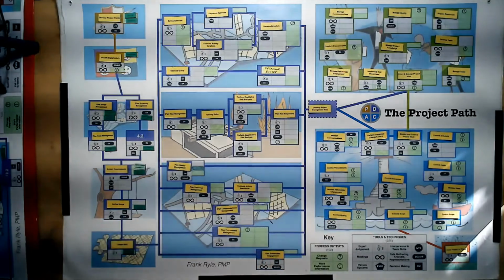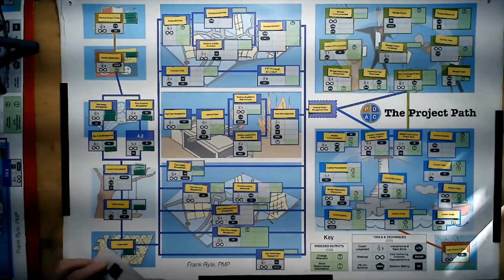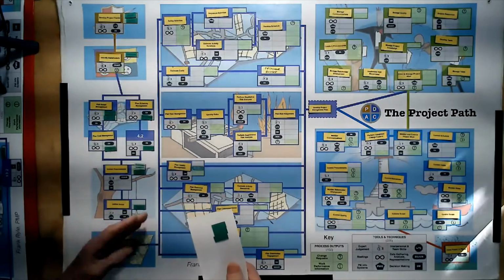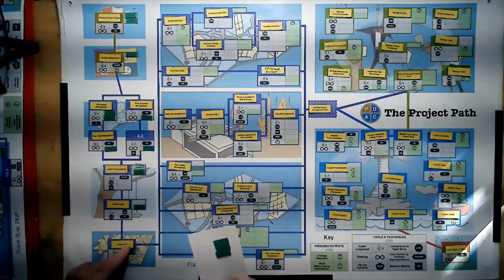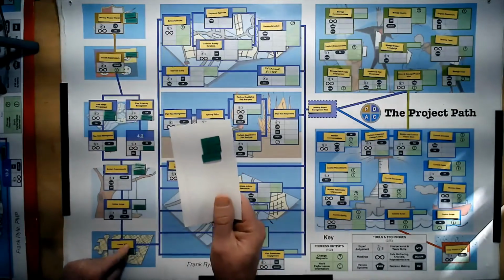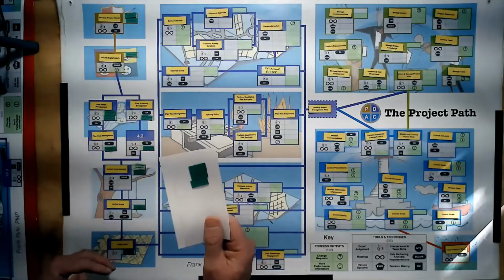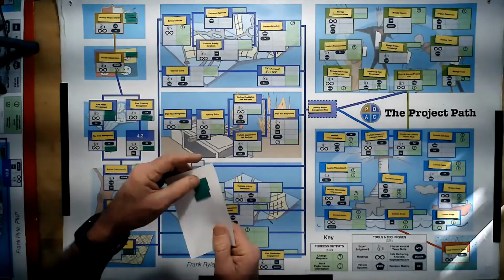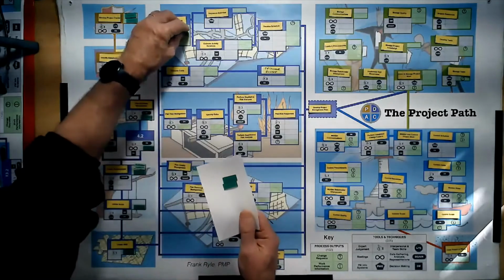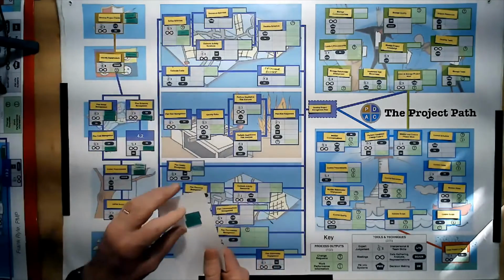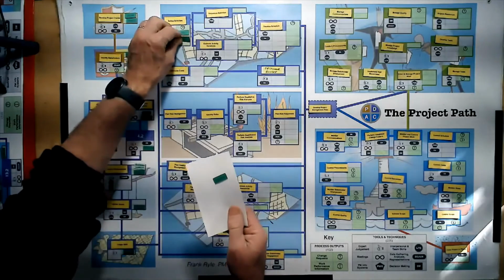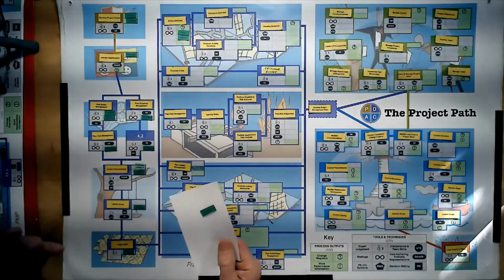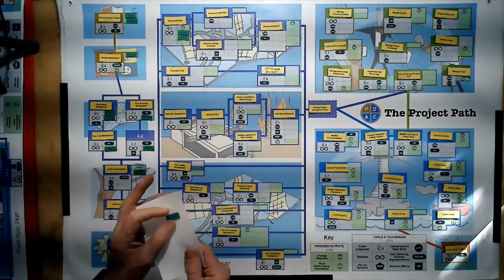Okay, so then following on from that, you can see some other outputs here. We're going to be looking at define the activities. Of course, these can all happen now in parallel once we have the work breakdown structure. Now, because the activity is a subset of the work breakdown structure, we do the decomposition, but we produce a few things. The first one is the activity list. That makes sense. Okay, there's an activity list. The second one will be the milestone list, which is milestones, these major events for the client that we will celebrate at some point in the future.